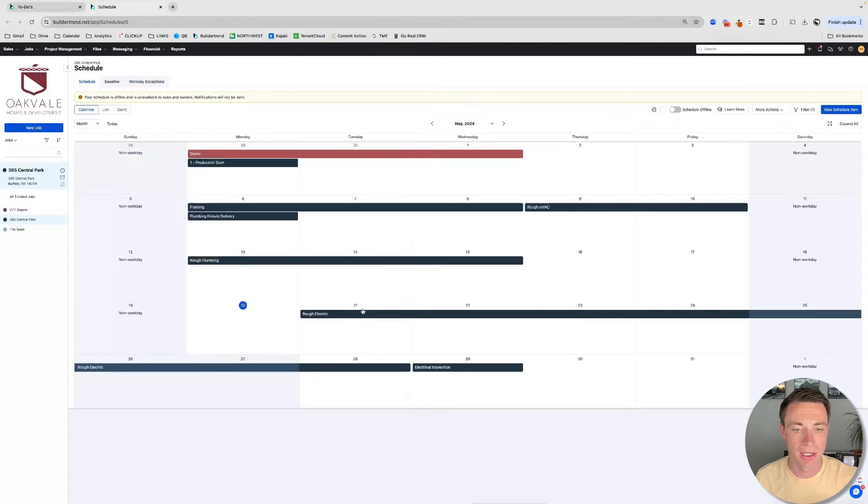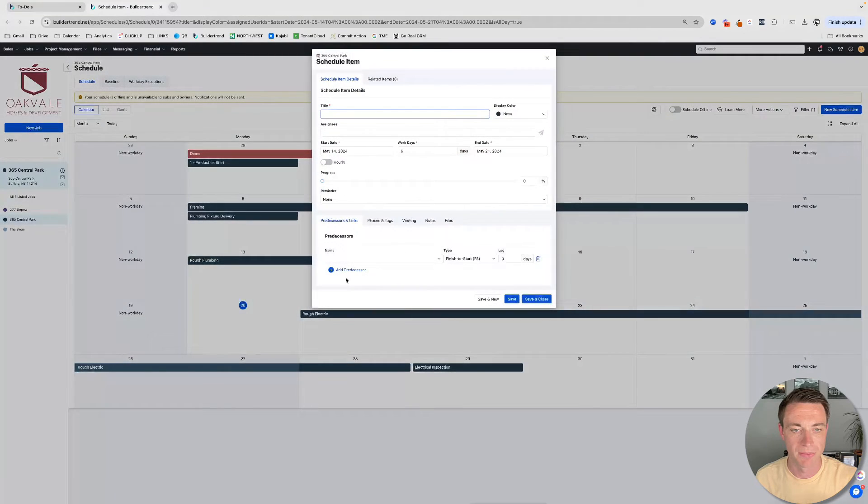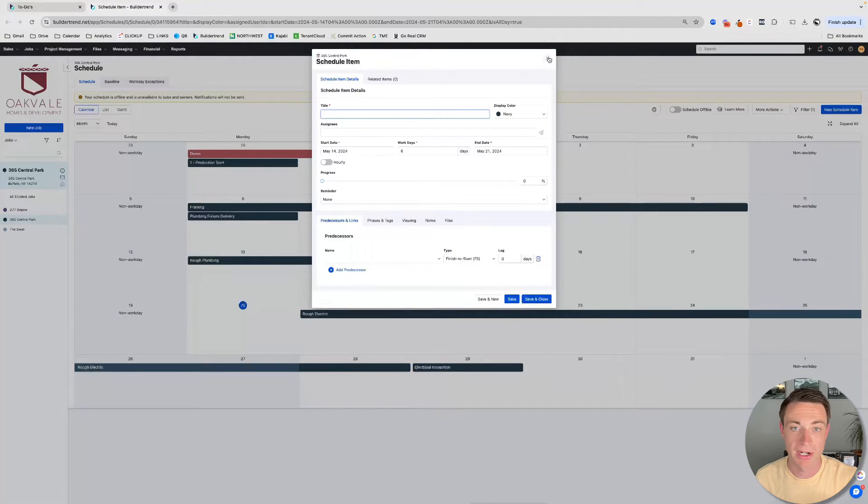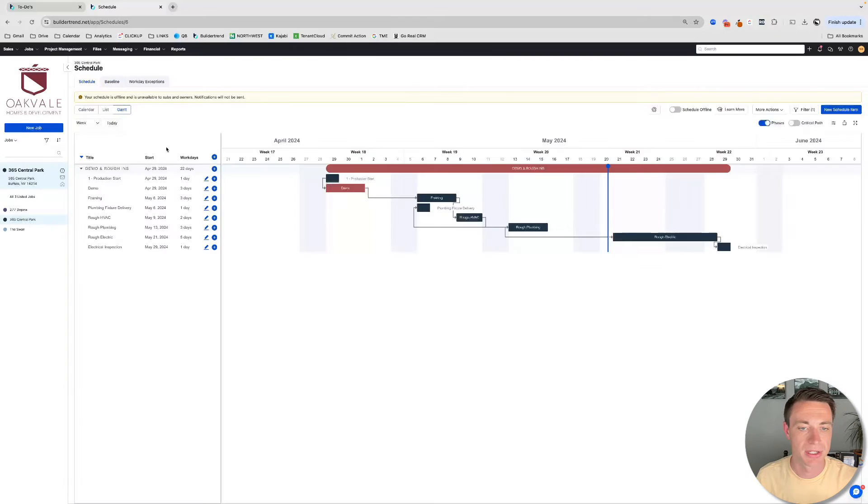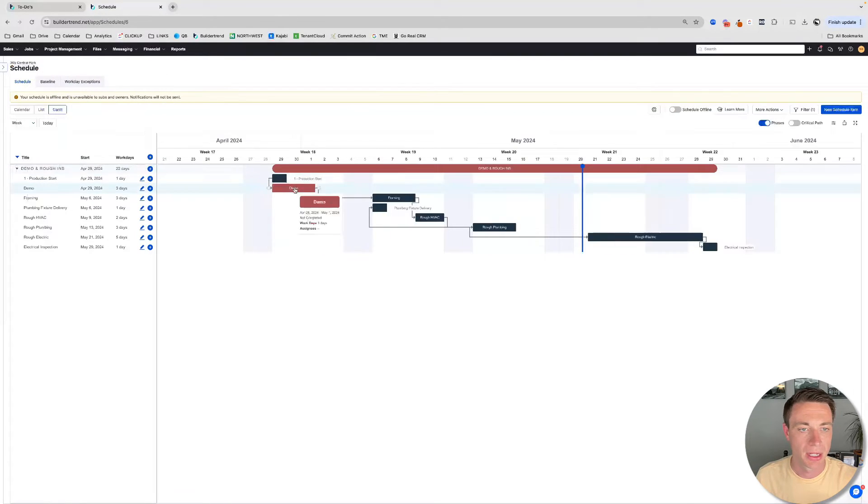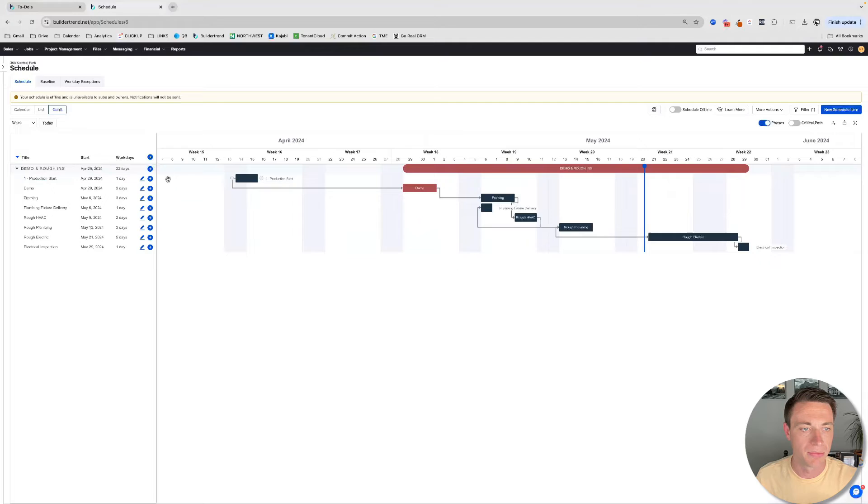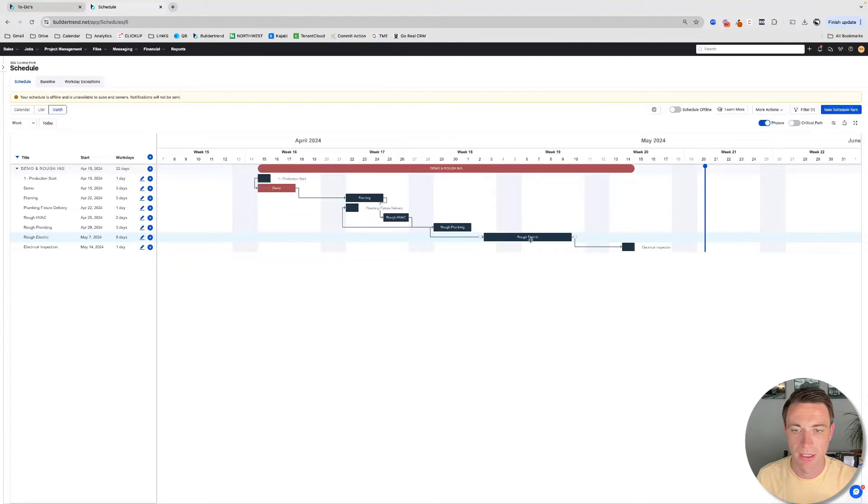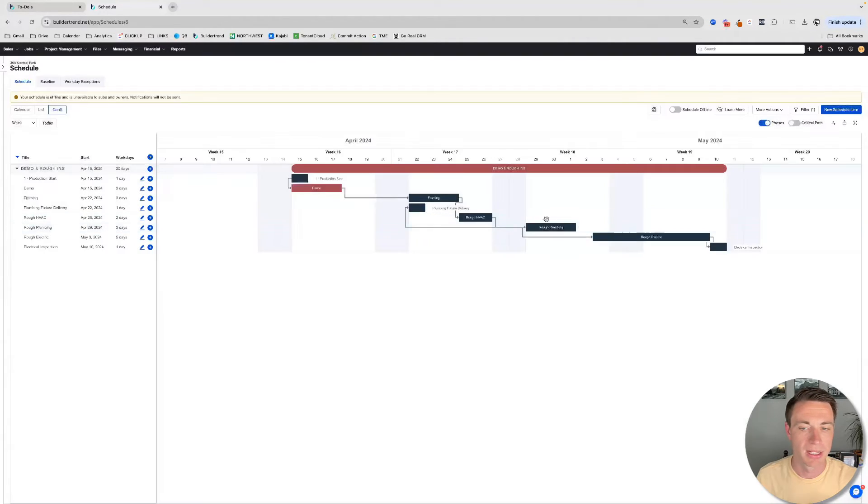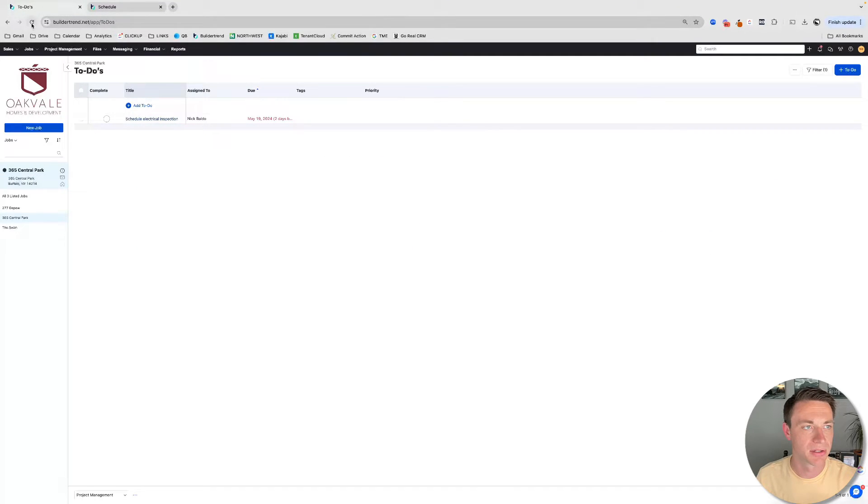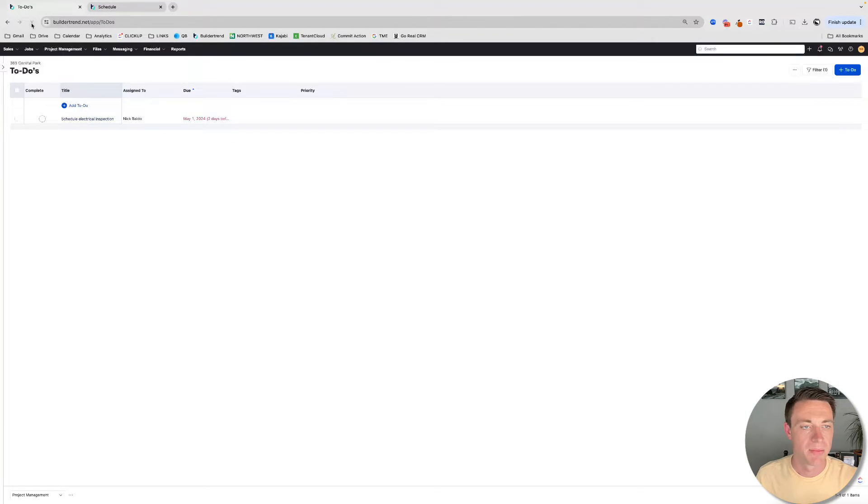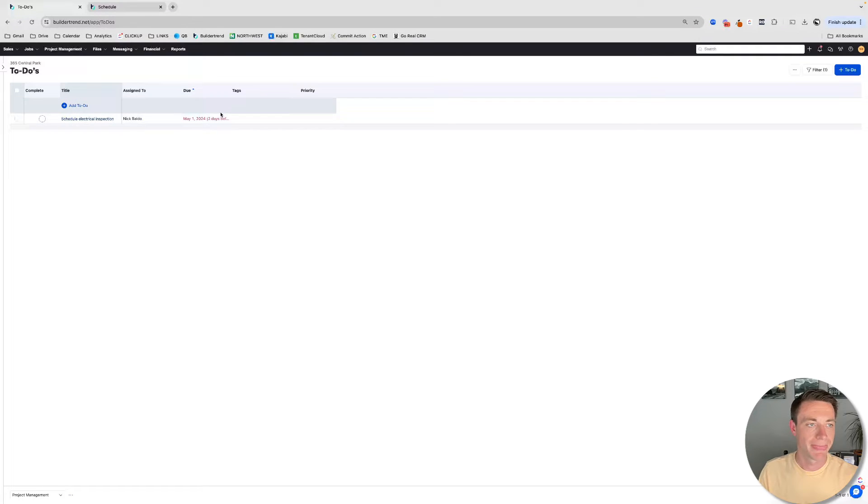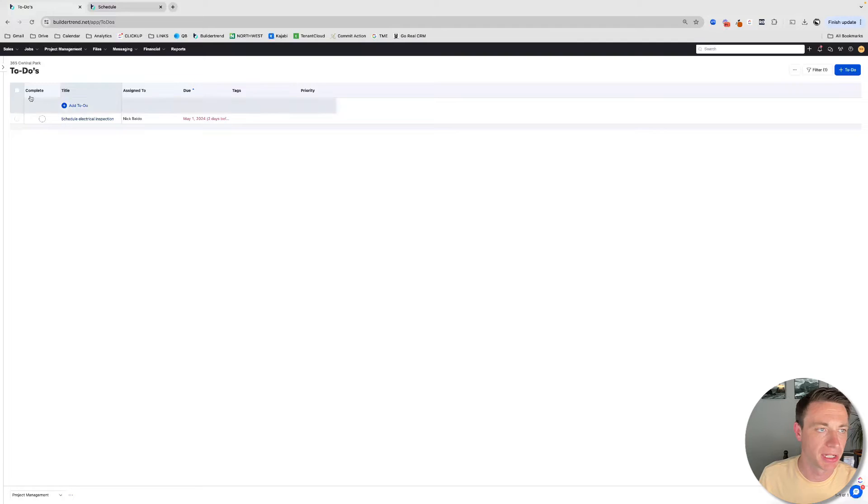And of course, on the other end of it, if the whole project, if something moved in. And actually, we could do that based on, like, the start date, too. So, it's really cool. If you do all this start date stuff, you can move the whole thing, and then everything is going to come with it. That might adjust, as you click and drag, it might adjust your dependencies. So just be watching out for that. But you can see that the due date then changes. Making the to-do dependent on the schedule is a really good idea.